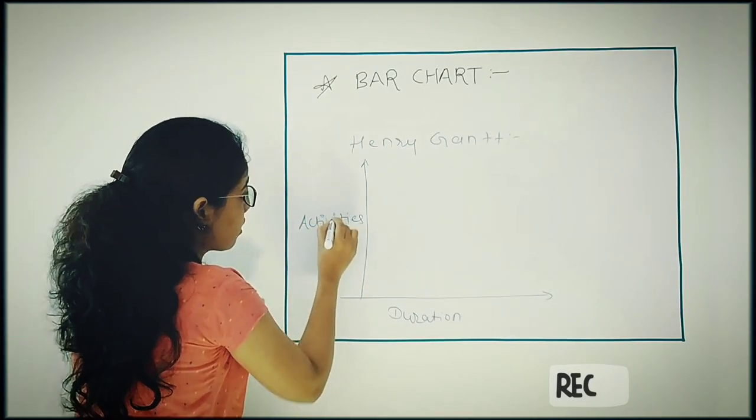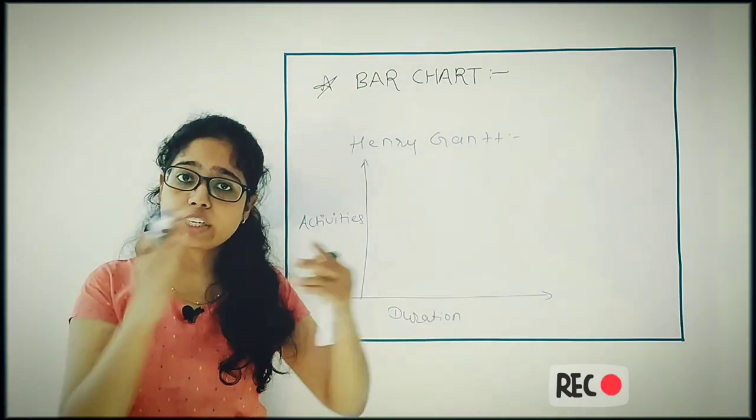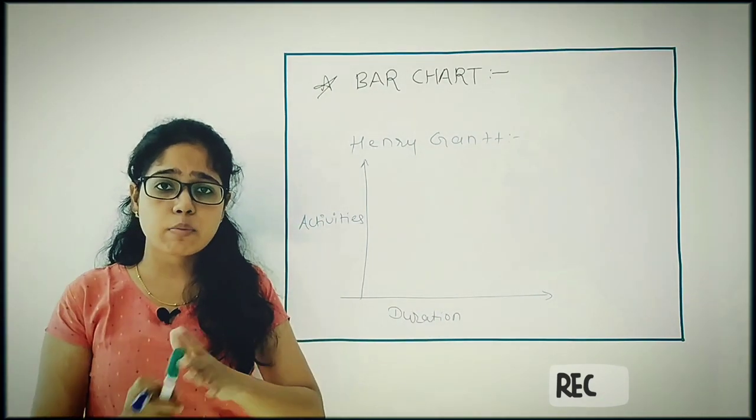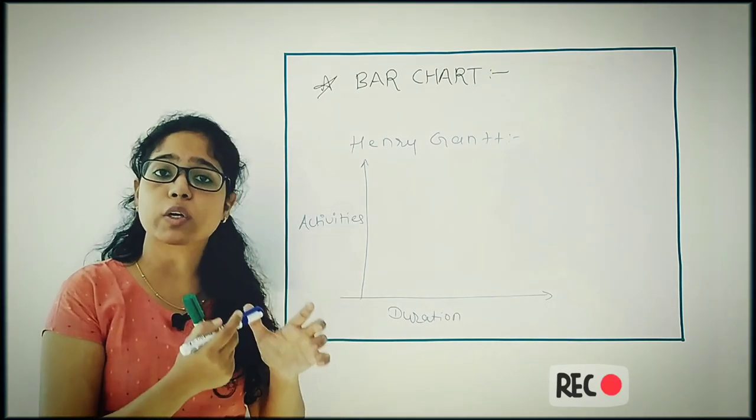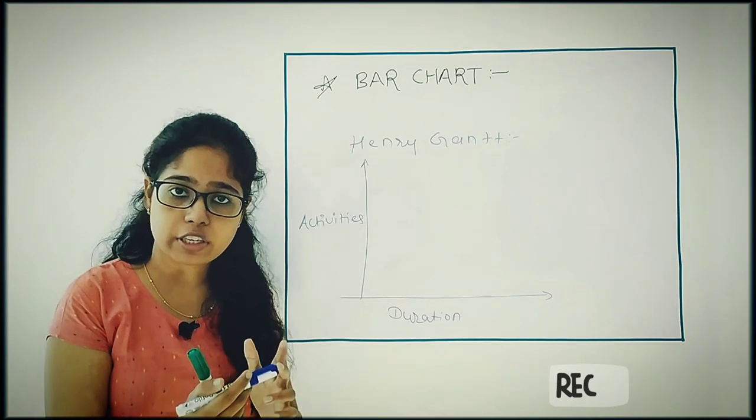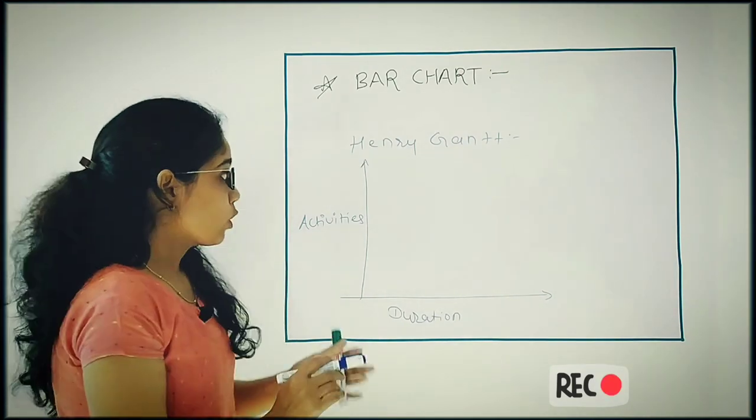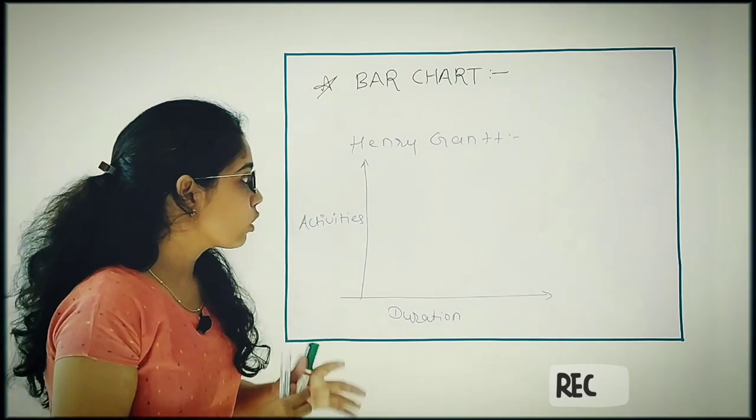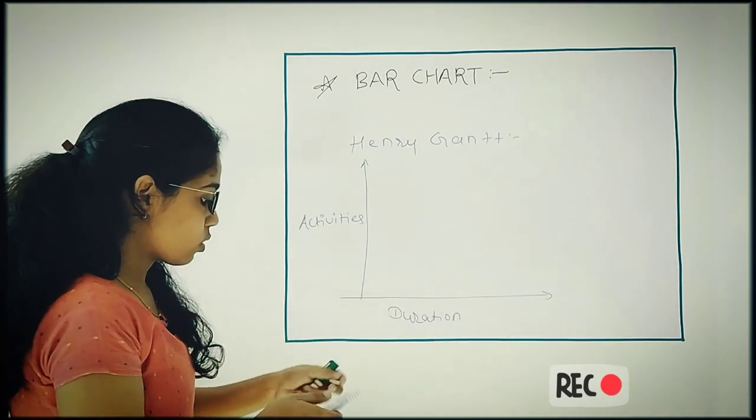And on the y-axis, you have to take your activities first. Now which activities you will take? First you have to divide the whole project into a number of sub-activities. Suppose one construction project I have and I am dividing the activities like brick work, plastering, electrification, plumbing, tiling work, painting, and likewise.